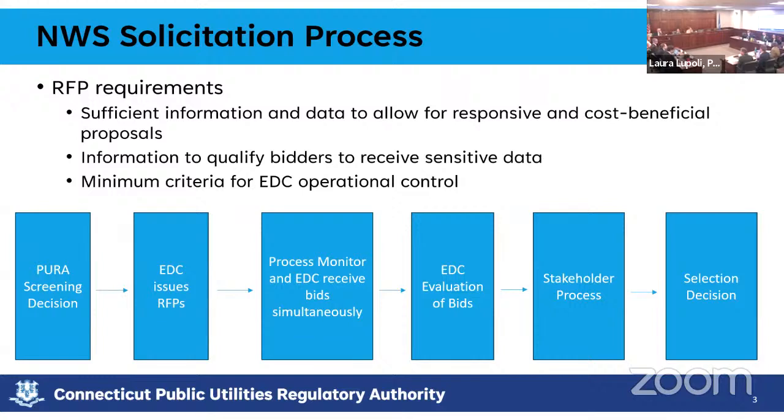Another question I have is those projects will also undergo the ISO New England interconnection process and study process. Is that correct? That is correct. Each of those projects are over 1 megawatt. I think there were 2 or 2.5 megawatts, and the third was 6 megawatts, I think. So they would go through the ISO I39 process also.